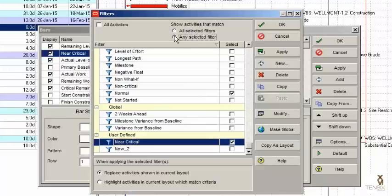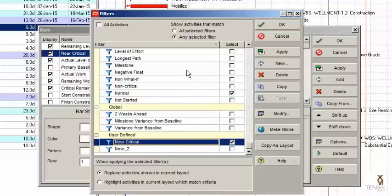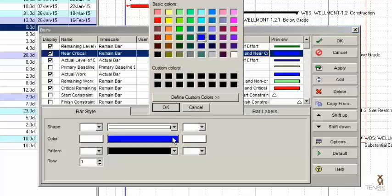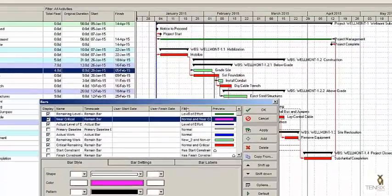I could also do 'Any Selected Filter', which would be Normal OR Near Critical — a larger set. But we want to do the AND, so put it back to All Selected Filters and select OK. For the bar style colour, I like to use the colour magenta for near critical bars. That is our near critical bar.